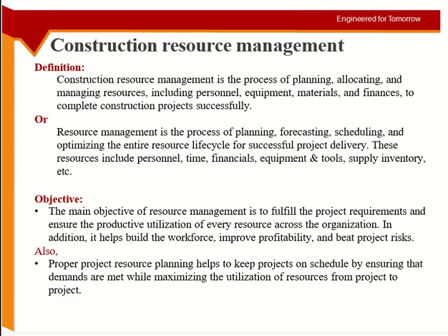Okay, so you don't overbuy things. This is a usual trend. Oh, I'm getting more projects, I'm becoming a bigger contractor. So I should hire more people, or I should hire more equipment. I had 10 people under me, now I have 50 people under me because I have more projects. But out of those 50 people, 10 are always idle. They are not doing anything, they're just taking your salary. So you did not plan it properly. You could have used only 40 people more efficiently without these extra 10 people.